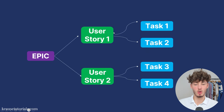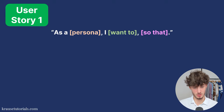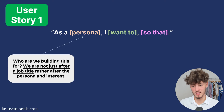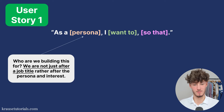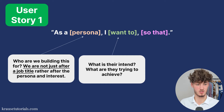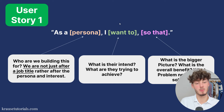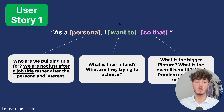The Epic is going to be a big abstract view of work which then gets broken down into several smaller tasks, also called issues — called User Stories. These User Stories would be the second tier in our hierarchy and basically these user stories follow a specific formula: 'As a [persona], I want to [intent], so that [benefit].' The first variable is persona — who are we building this for, not just a job title but the actual interests of the customer. Then 'I want to' covers their intent — what are they trying to achieve. It's important to follow this structure as most project management teams are used to it.